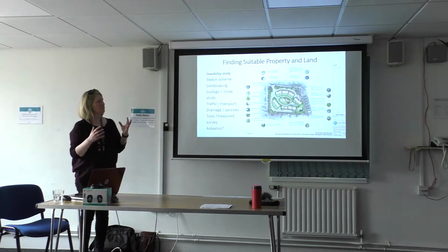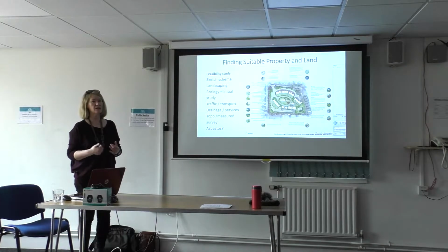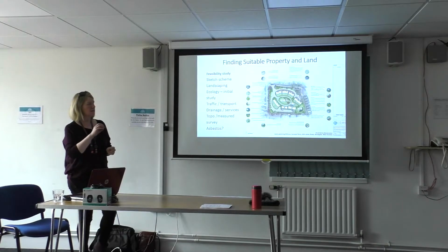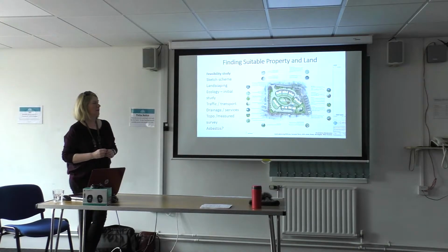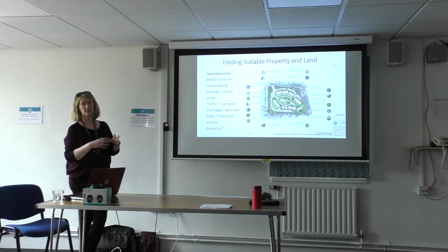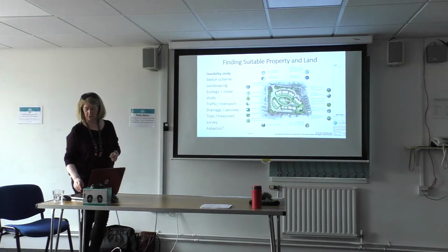Also, if you're intending to build quite a few units, then you probably need to have a look at the transport and traffic implications of what you're intending to do. The council will certainly want you to look at that, so it might be worth getting an initial study done. And of course drainage services and asbestos maybe, if it's an existing building, because that can be very expensive to get rid of.